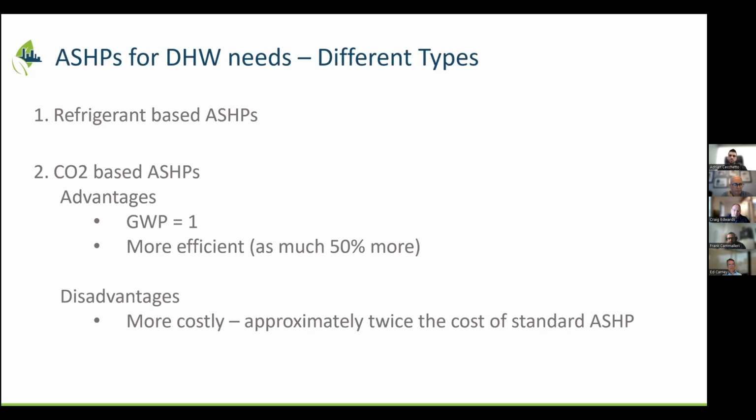Well, they're still around 30 weeks or less. They've been able to hold that currently, at least with the water side units. The air side are actually under 20 currently. It's all over the map. Some manufacturers are still 30, 40 weeks. Oh, wow. Okay. Sure, our audience is aware of that. Yeah. But we've been fortunate that we're under 30 with the water side and under 20 with the air side. Okay, that's good.